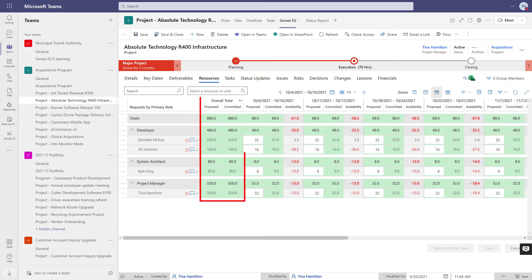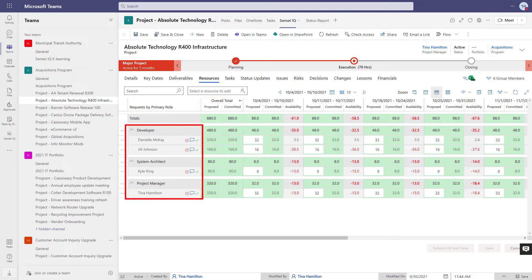When this was still a proposal, we built the resource plan and had it approved along with the business case. The team consists of two developers, a system architect, and a project manager.